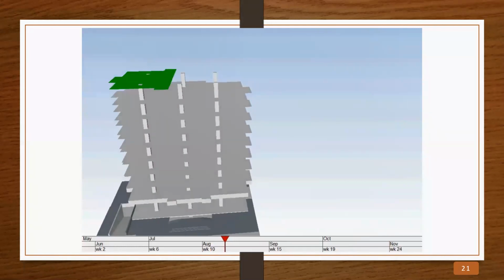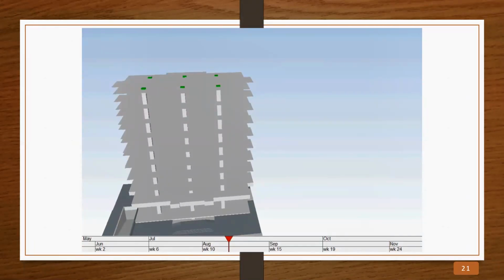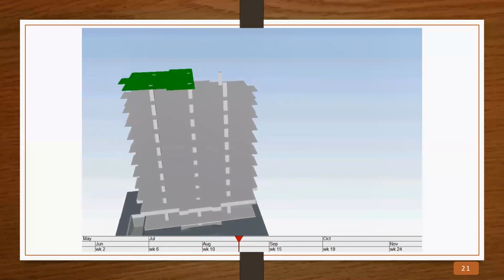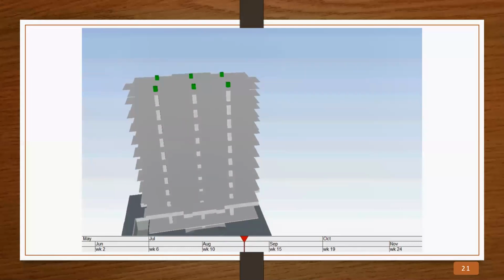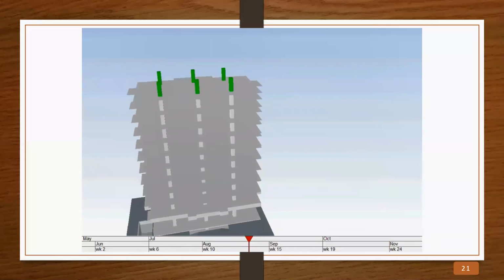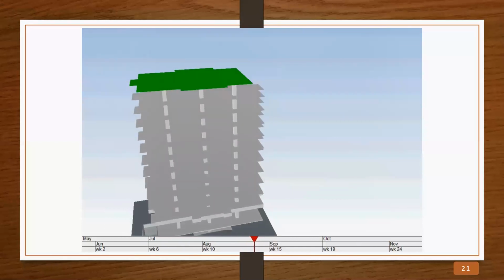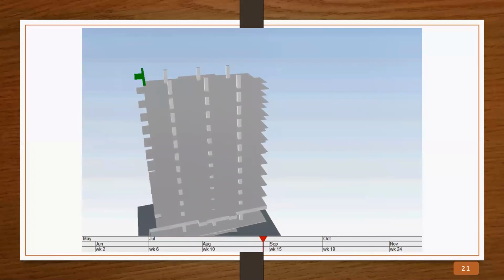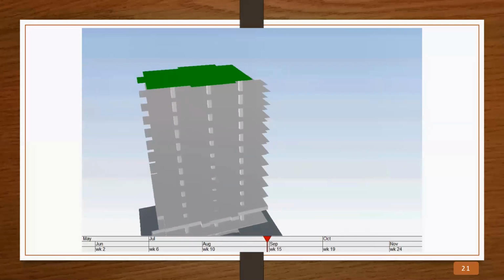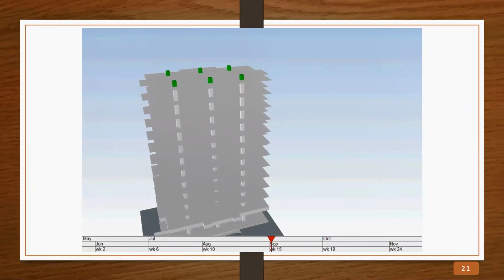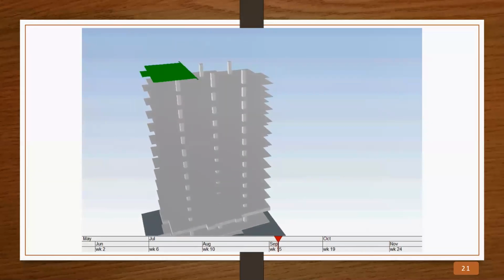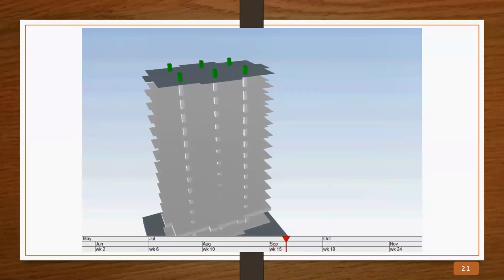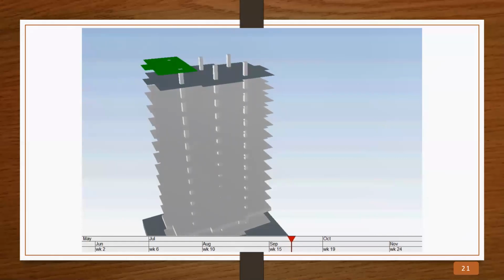Again, you're just taking your 3D model or whatever model you have and combining it with your project schedule. And just to highlight also, we are working with the Bentley Synchro software, and it can read most of the readily available engineering design software. For schedule, the two most common schedule software you use are Primavera and Microsoft Project, and you can upload those directly into the software.